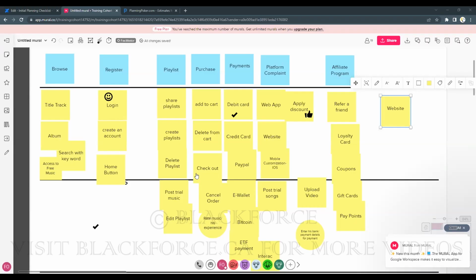So what kind of questions would you ask the team? There are a lot of questions. You want to see their sprint burn down chart. You want to understand their velocity, to see if the story points they are taking every sprint are almost the same, or sometimes they are doing 50, another time they are doing 30. Like, what is the problem? Why is this so? Why is the kind of work they are achieving so different?